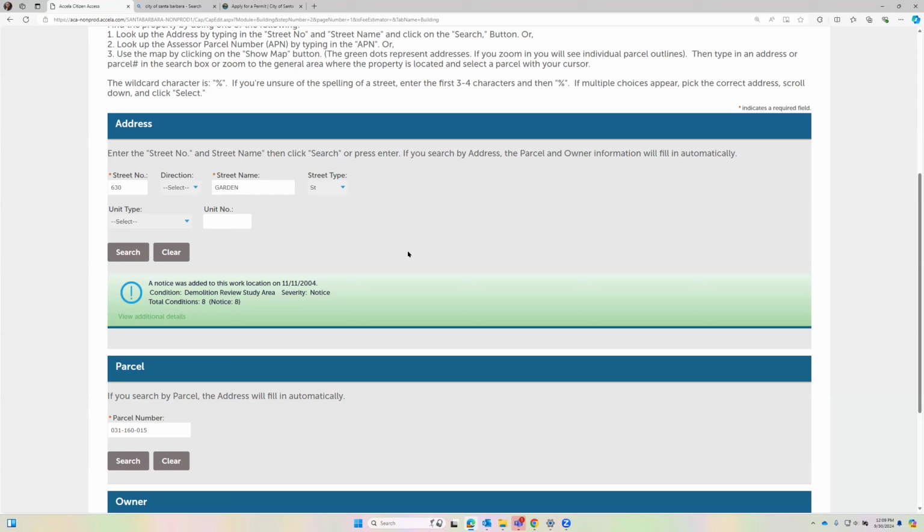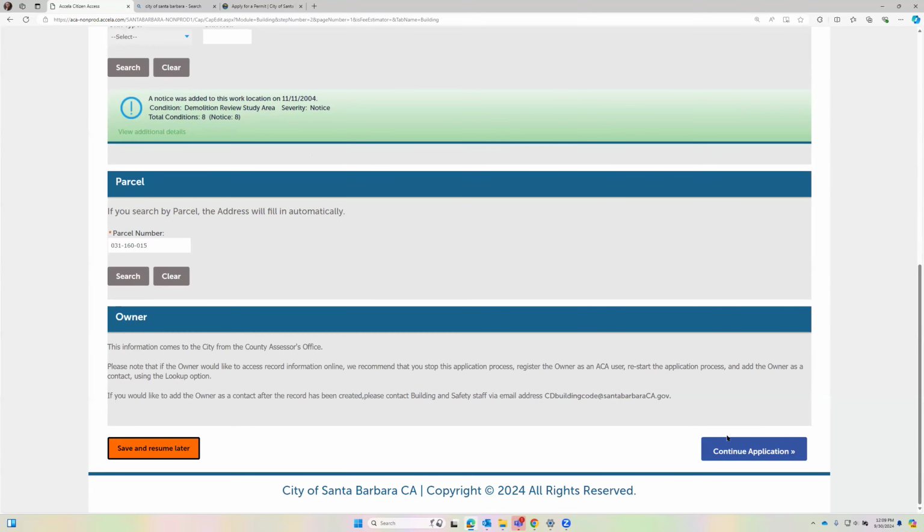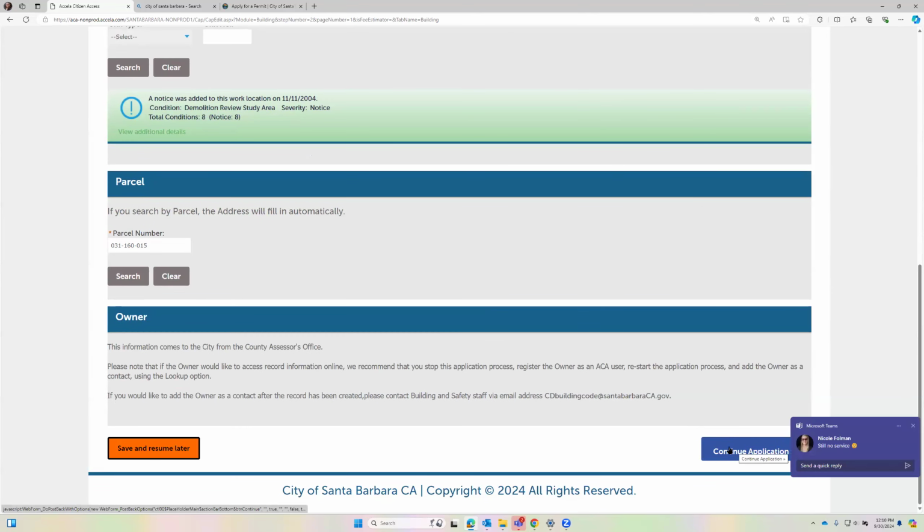It's going to plop an address onto there that's going to be different than the address of, for example, the Gelson's parking lot. There's multiple addresses in there, but the parcel is one. If that ever happens to you, feel free to just go with the address that the system's giving you. Then when you get to the part where you can put in your description for the project, put the address that it's supposed to be in there. The counter staff will know to update the permit text, because we can update the address, and you cannot. I'll clarify on another step where that would go.